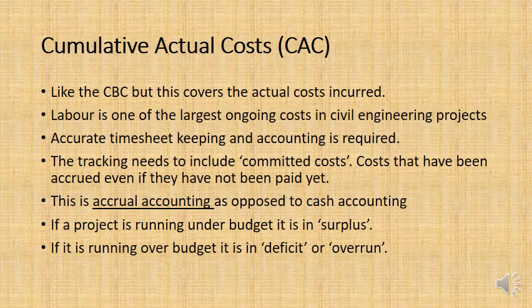So accrual accounting, as opposed to cash accounting, is where you are measuring committed costs, not costs when they have to be paid, but costs as and when they are being accrued, basically when they are being recognized and will have to be paid in the future.